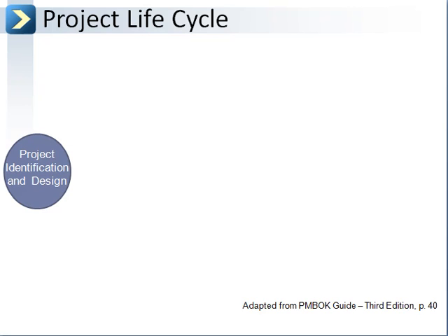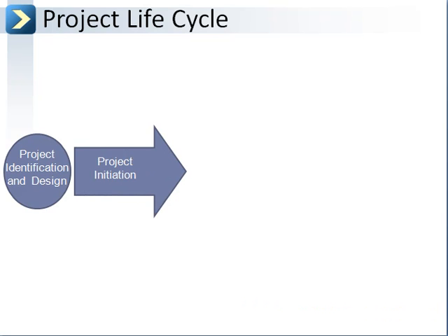Once that high-level identification and design is completed, the project can go through an initiation process, which could be multiple steps. It could be a concept paper leading into a discussion piece, a project proposal, and ultimately a project charter. The steps in the process are all intended, even if they are different from one organization to another, to assure that organizations aren't investing in the development of a project or investing in activities of a project that is not officially supported and approved, either internally or by key external donors, and it provides a green light for investments on a project.